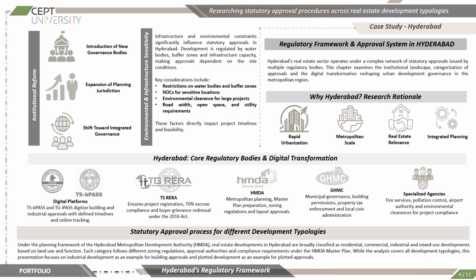In addition to these, there are specialized agencies such as fire services, pollution control boards, airport authorities, and environmental departments that issue conditional approvals depending on the requirement of that particular project.